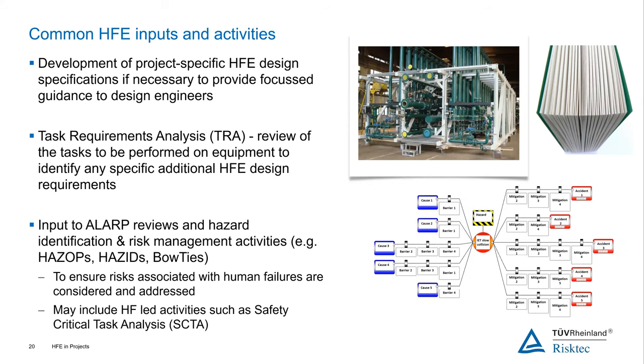And as I mentioned, one of the other things would be input to alert reviews and hazard identification and risk management activities. So things like HazOps, hazards, and bow ties. There's always an element in those of looking at the potential for human failures. And so bringing in an HFE specialist is recommended to ensure the risks associated with human failures are properly considered and addressed. As well as taking part in these processes that involve all of the different design disciplines, there may be additional activities that are led by the HFE specialist, such as safety critical task analysis. That's a more focused risk analysis that's specific to human factors. And we have another webinar that covers that specifically that you can have a look at.